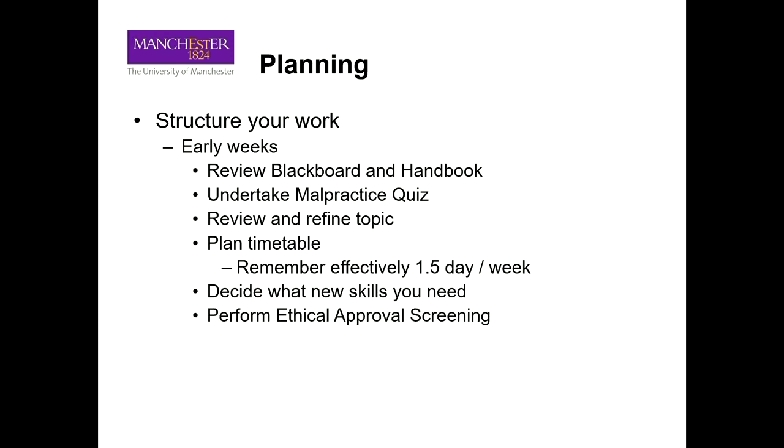Oh, another one is ethical approval. Okay, it's easy to underestimate how much time it takes. If you need to access personal data or medical records or things like this, I'm not too familiar myself with this, but I know it takes a lot of time. You need to write an application, go through a process before you can get approval, and that always takes ages. Okay, I think this is relevant to, for example, some of the management projects.